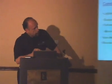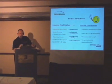So the modular steel frames, again, give you the low pick weight, lightweight, double beam frames. I'll show you why, in the modular approach, we keep 2 beam modules. You could probably engineer out and have fewer beams, but for transportation, to load it on a truck and get it cost effectively out to a job site, 2 beam modules that can just be set right onto the abutments are the cost effective approach, and they eliminate all field welding.